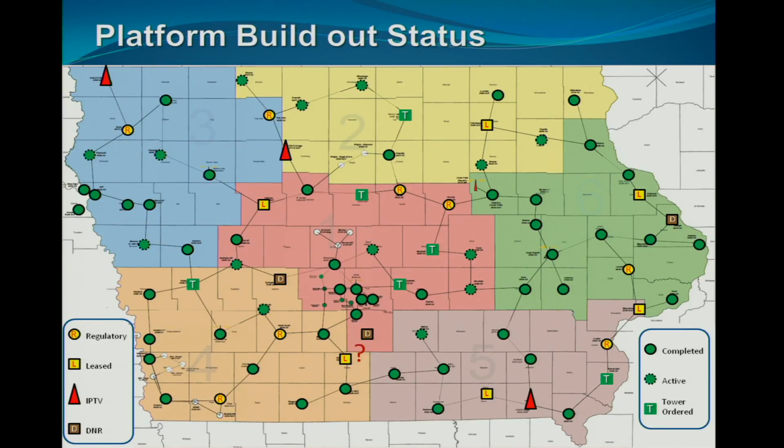Correct. I agree. Right now, the biggest push is, before the winter sets in, we're trying to get all the concrete in as fast as we can, with the drilling rigs and all the forming and all that stuff, before it snows. Because then the stacking of the towers and dropping off the shelters, which we have at the warehouse, can be done. Right now, the whole focus is drilling and pouring concrete.